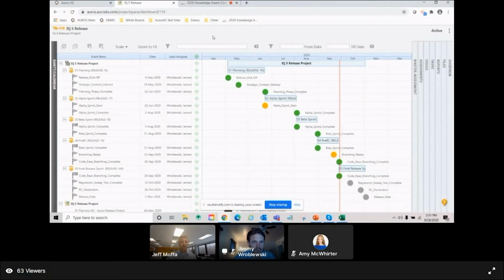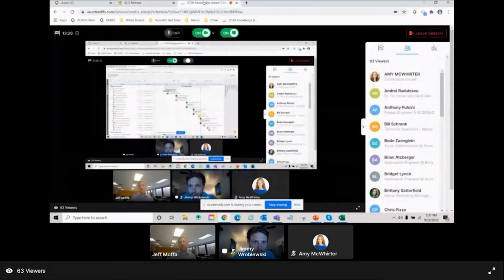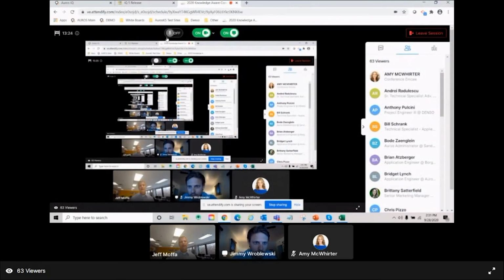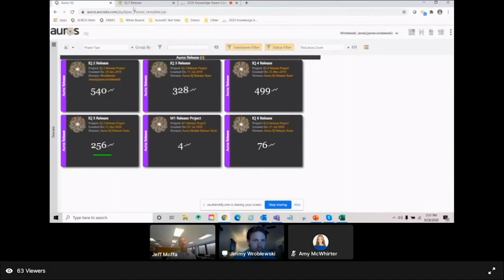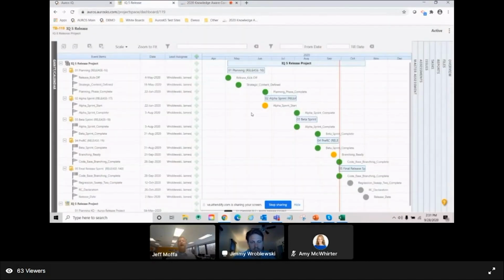He's our Scrum quarterback, so to speak, Scrum leader, amongst other things, and he manages the activities in the software process. So Jimmy, the way it works is we put in our release date and it goes backwards. We put in a certain number of dates and all the dates get computed based on our method. So Jimmy, if we go back and now slide over to the master assessment.